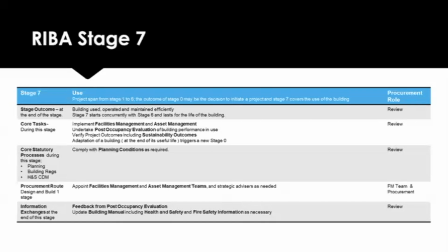It tends to happen on really big stuff, like big hospitals or something like that. And that's to ensure that they build it to the best quality, because they would be responsible for maintaining it for the next 5 years. So it isn't in their interests, I suppose, to do it cheap and then just walk away. So in some instances, we would hold the contractor responsible for maintaining the building in stage 7 for a period of time too.